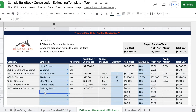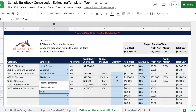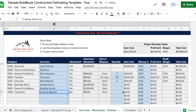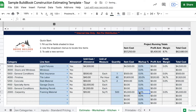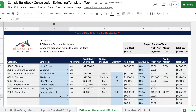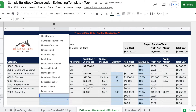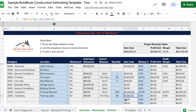The Estimate worksheet is where you'll spend most of your time, itemizing all the things involved with the project. This is where you specify all the individual services that roll up to the categories you specified earlier. Say you want to add some framing — you can go to the line item column and start typing. The two matching services I set up, Materials and Labor, are options. After you select one, you can specify quantity and markup. The markup is not shown to the customer, and there's a separate sheet that will roll all the individual services up to those main categories.